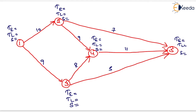Now we will calculate Te, Tl, and slack for all the events. For event 1, Te equals 0. For event 2, Te equals 10. For event 3, Te equals 9. For event 4, Te is the maximum of (9 + 8 = 17) and (10 + 9 = 19), so Te equals 19. For event 5, we compare (10 + 7 = 17), (9 + 5 = 14), and (19 + 11 = 30), so Te equals 30 as the maximum value.